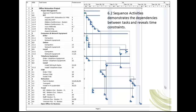Tasks often have interrelated dependencies. Computers cannot be installed until the network is installed. The network cannot be installed until the wiring is installed. The wiring cannot be installed until the furniture is installed. The task PAC in Boston has multiple dependencies: award contract, install furniture, install network, install telephones.